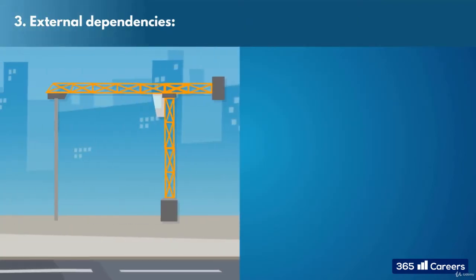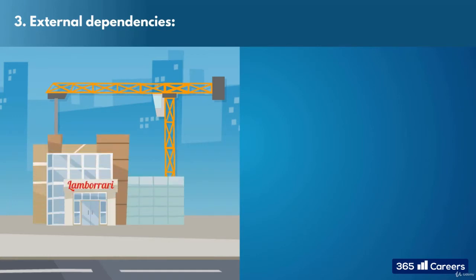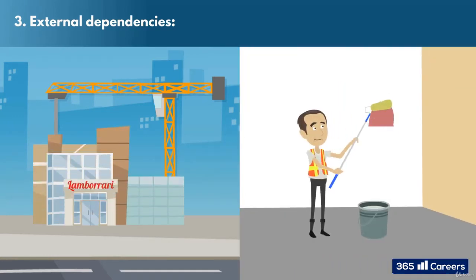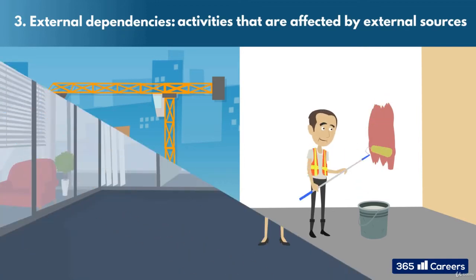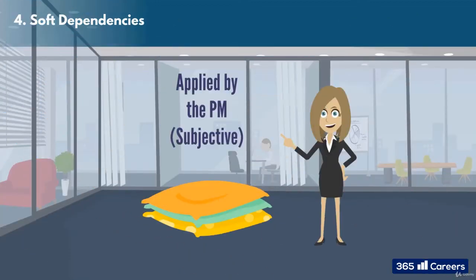Third, we have external dependencies. These can be anything from building work that needs to be signed off by the city, to paintwork that can only be done in good weather — the activities that are affected by external sources. The fourth are called soft dependencies. These are applied by the project manager themselves, and could include things like a task not going forward unless the project manager has checked the previous task. They are called soft dependencies as they are easily amendable due to the fact that the project manager set them in the first place.